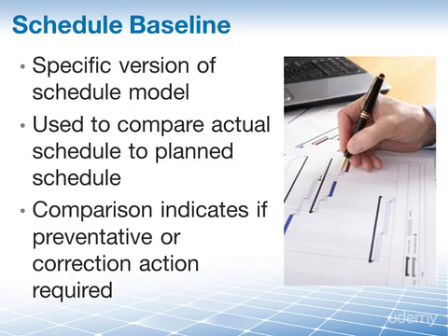Are you already seeing some kind of a trend here in regards to the baseline descriptions? Final note on this one. The schedule baseline, by the way, will also tell you when costs will be incurred, because it tells you when and in which order schedule activities are going to occur. And since we have to pay, for example, resources that are going to be working on these activities, that means that the schedule baseline allows us to determine when the expenditures, when the cost will happen. That's the reason why we use the schedule baseline as an input to the plan cost management process. It allows us to see when cost will occur.